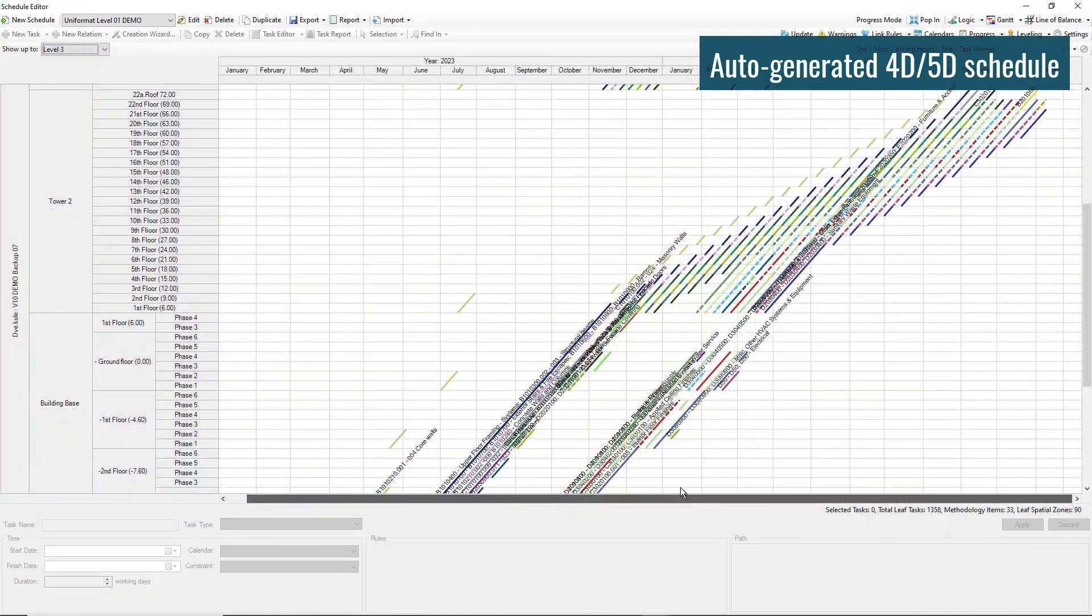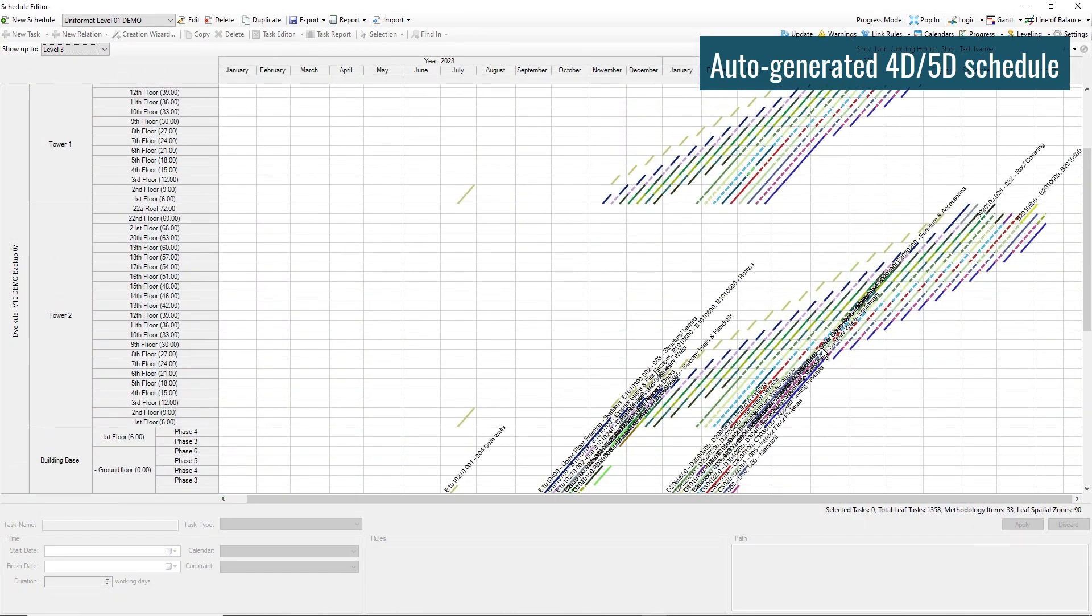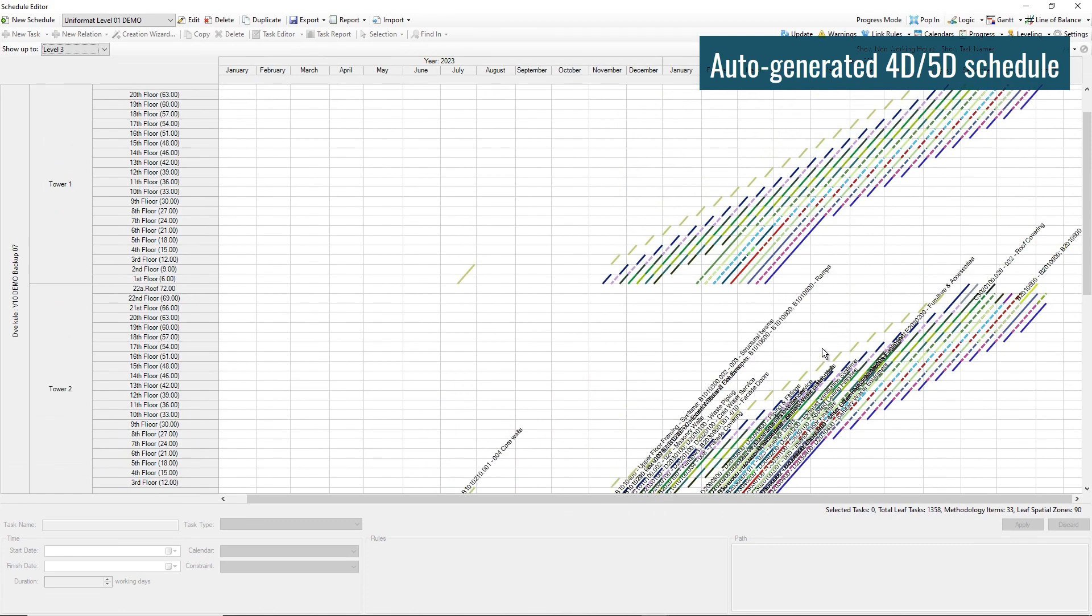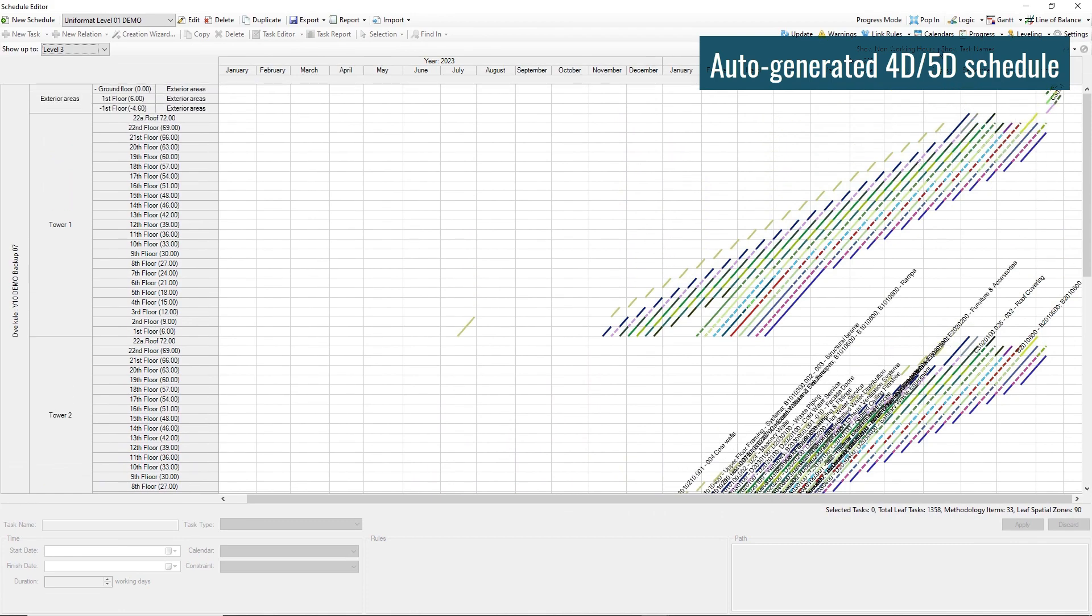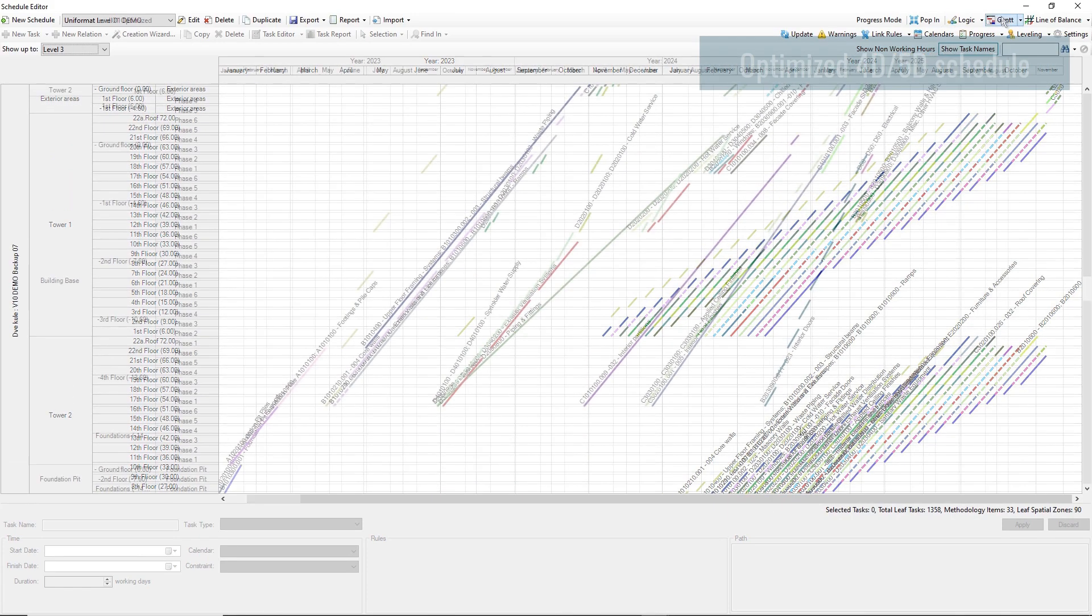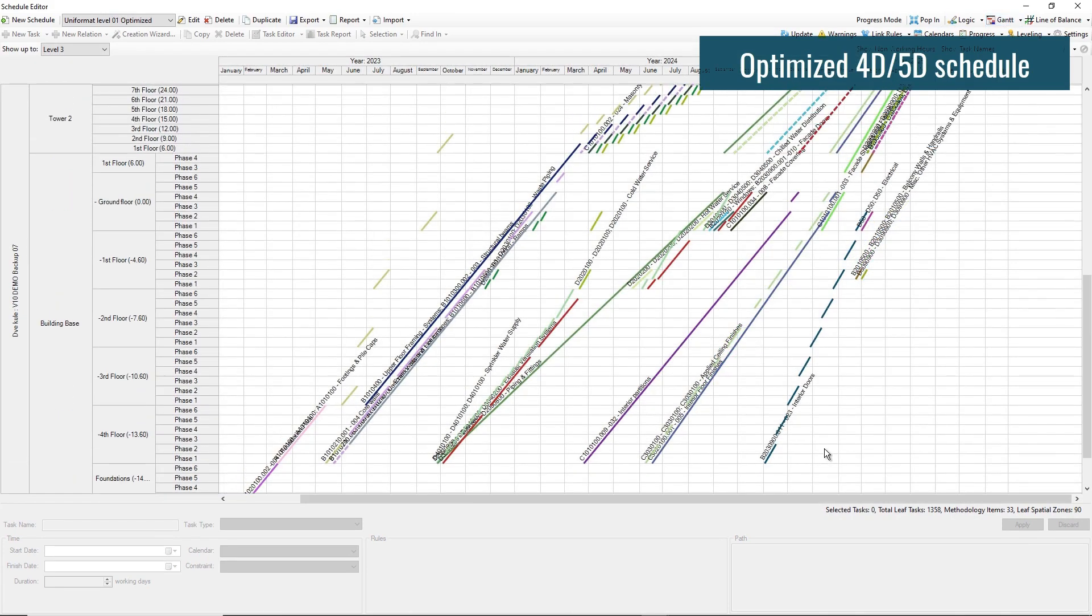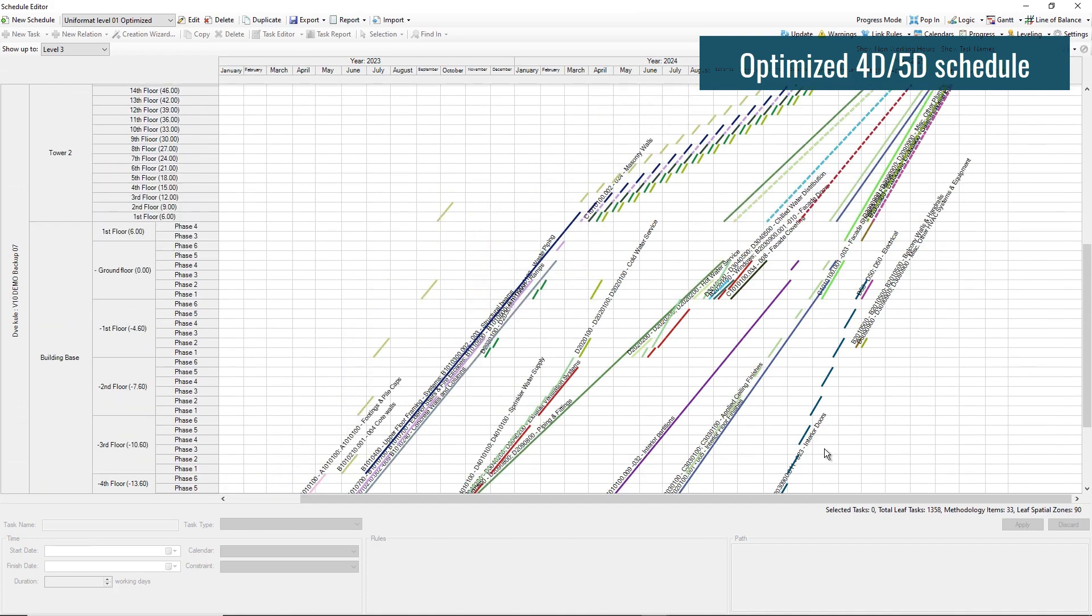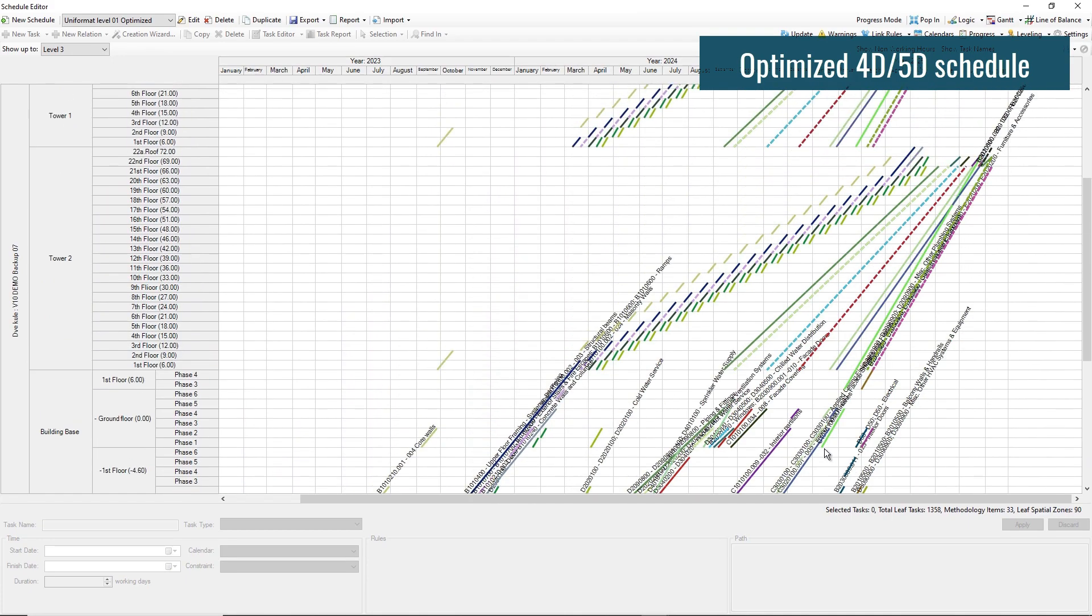Fine-tune and optimize the initial generated schedule with options for automatic task duration calculation and resource leveling. Adjust line of balance, check critical path, change relations.